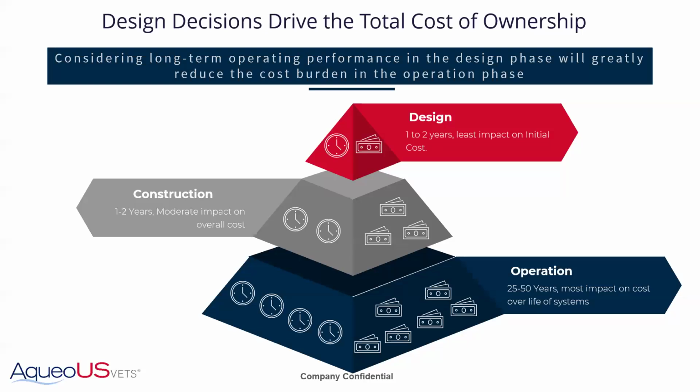We mentioned the 5-year time frame in terms of having to do something here. 5 years may seem like a long time, but it's really not. You got a couple of years of sampling. You got site surveys. A lot of places don't have anything at these sites. Then design and construction, so it can take a long time.